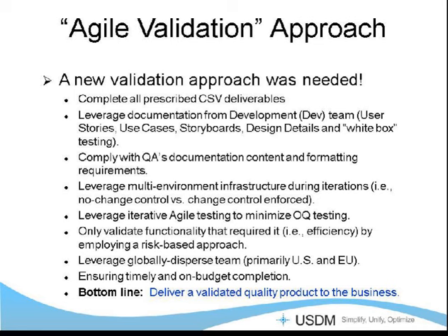And when I'm talking about short order, I'm talking about something along the lines of 9 months from the time that we started doing the initial planning to the time of the first deployment. So that's 9 months to develop the application, to put in all the environments, to put in the infrastructure, to do all of the testing and do all of the validation activities, training, and deployment in 9 months. So that was a very short timeline, and I'm happy to say that we actually made that.